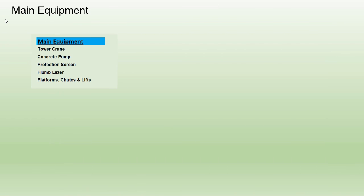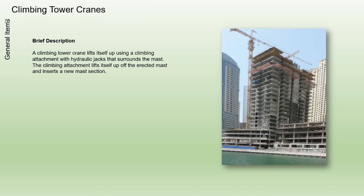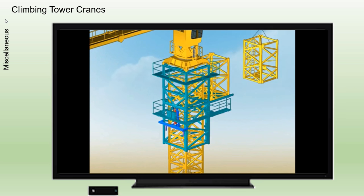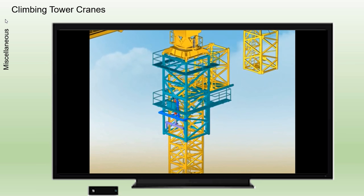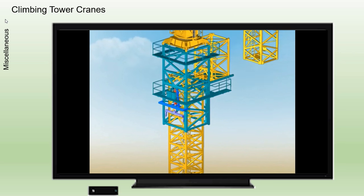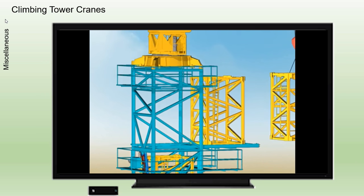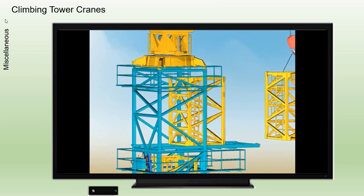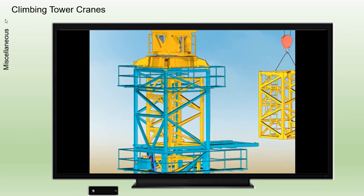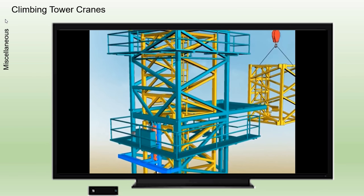Main Construction Equipment and Plant — Tower Cranes. A climbing tower crane lifts itself up using a climbing attachment with hydraulic jacks that surrounds the mast. The climbing attachment lifts itself and the top of the crane up, off the erected mast, and inserts a new mast section. Above a certain height, the crane mast is anchored to the building using tie collars.